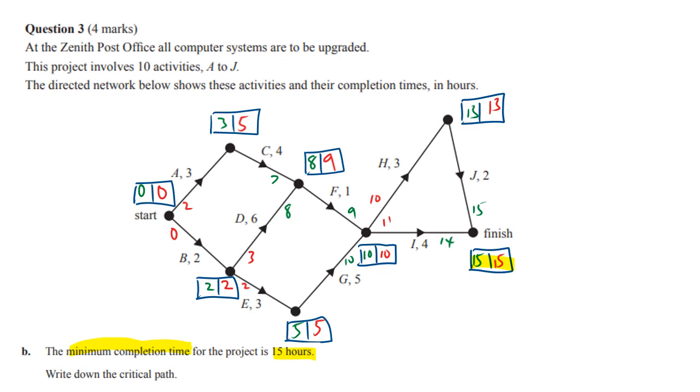And it says write down the critical path. Again, we highlight all the ones where the numbers are the same in my beautiful, neat, clear handwriting. That's definitely a 13, so don't complain. And there's 2's, not Z's. So if we follow down the 0, we've got the 0 here. If we follow that down, we find that the critical path looks like this. Again, there is that problem. I call it the triangle of death, a bit over dramatic, I guess. But you see, we've got this triangle, and that path is 5, and this one is 4, but it's not really showing up here that saying that I has got no float. There's definitely a float of 1 on that, and I'll talk a bit more about that in a minute. But there it says, for the moment, write down the critical path. So the critical path for this case is B, E, G, H, J.